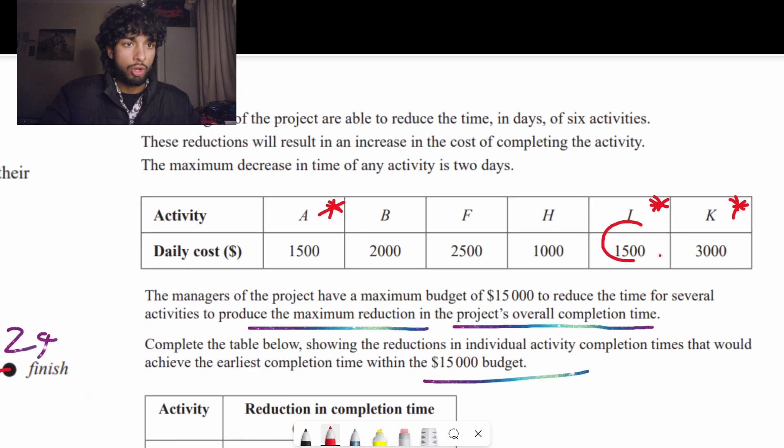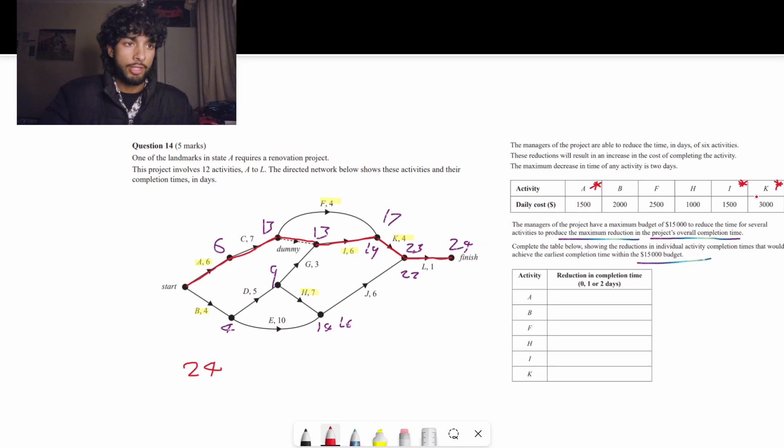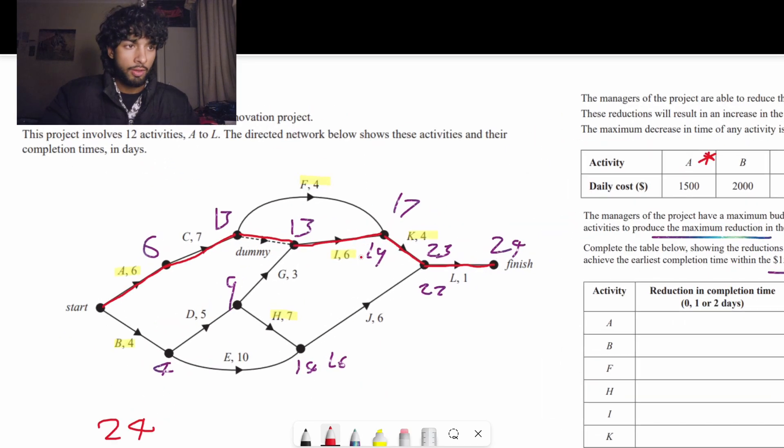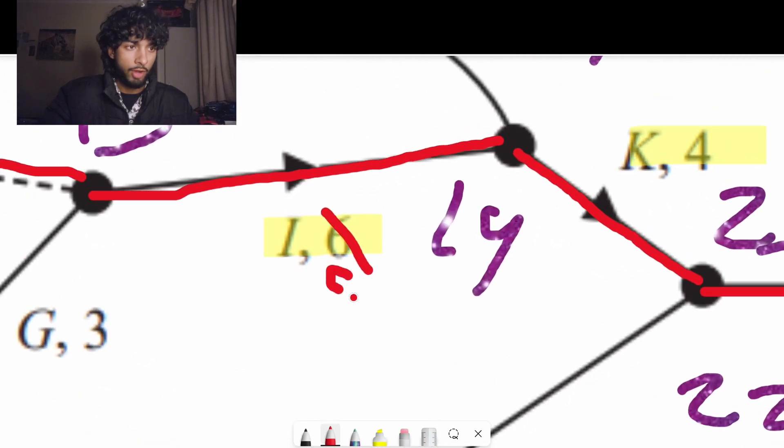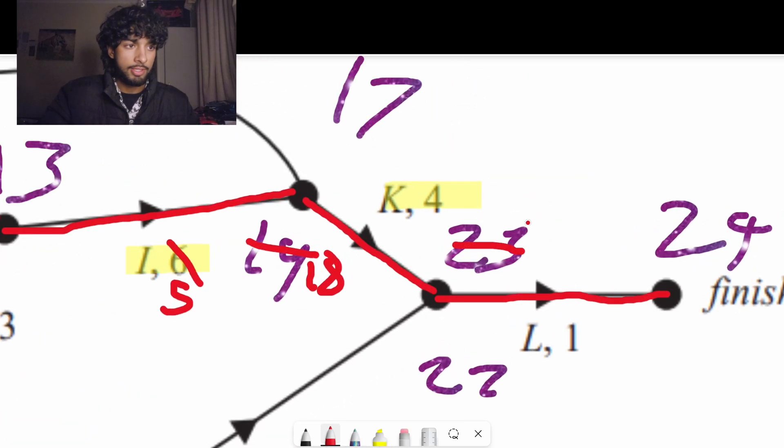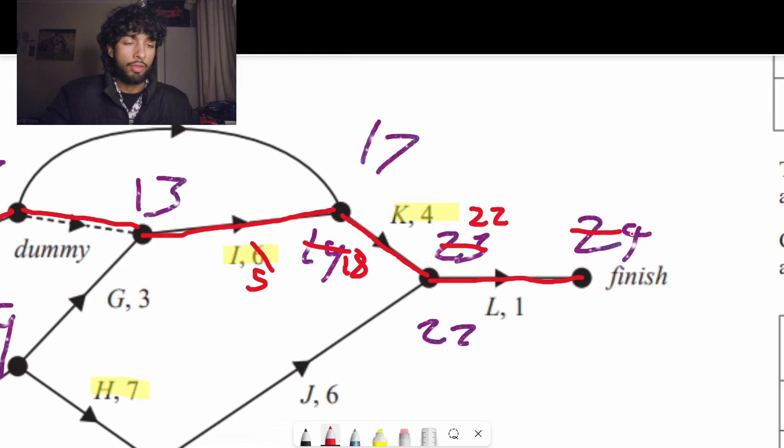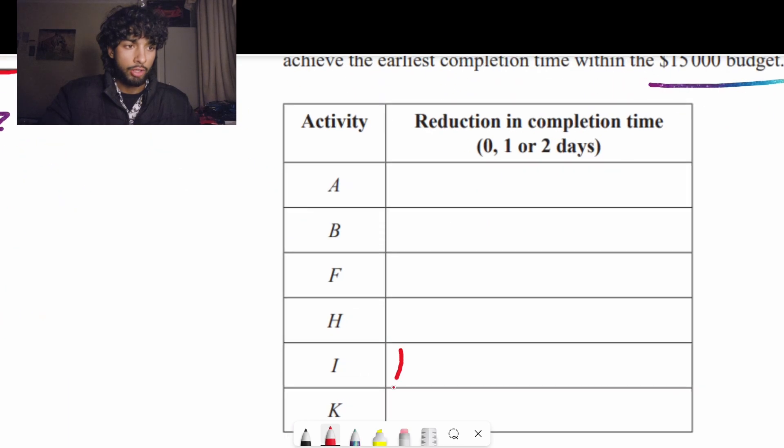Cheapest options are i and a. For this specific question, it doesn't matter which one we crash first. So let's go with i. If we crash this one time, it becomes five. And now instead of 19, it's going to be 18, which means that this is now 22. And now the overall completion time is 23.